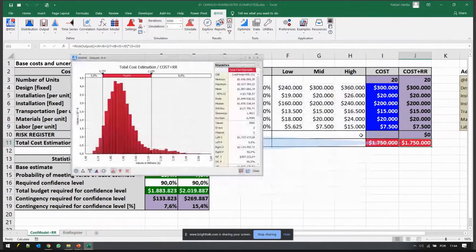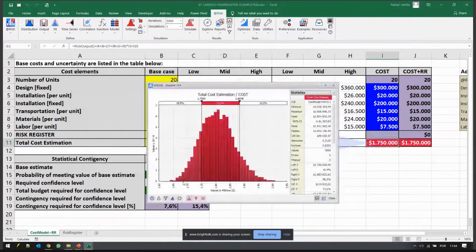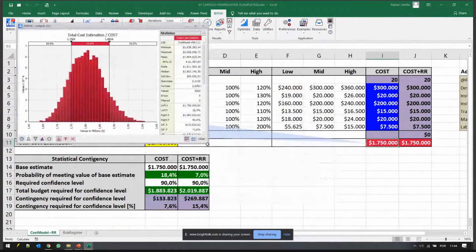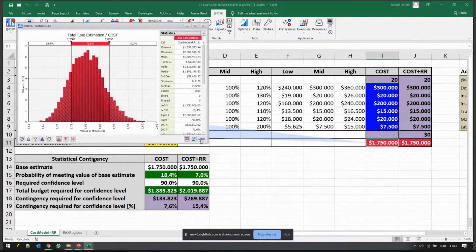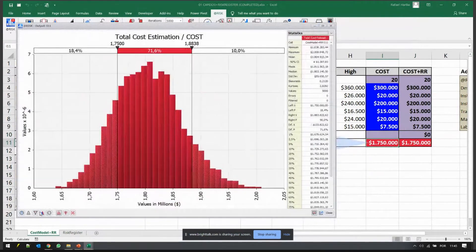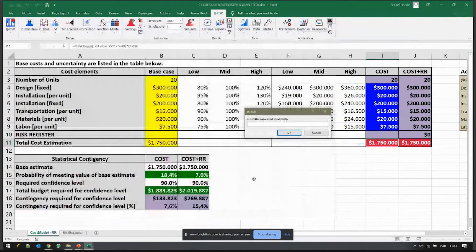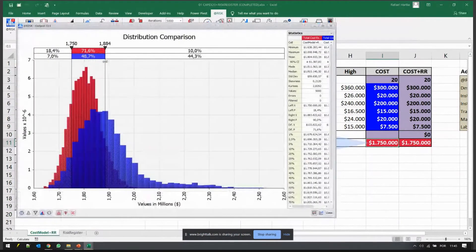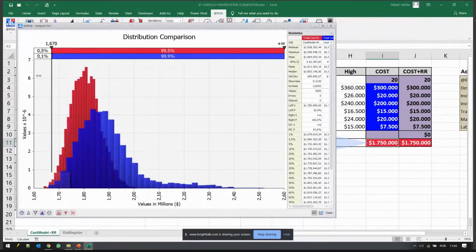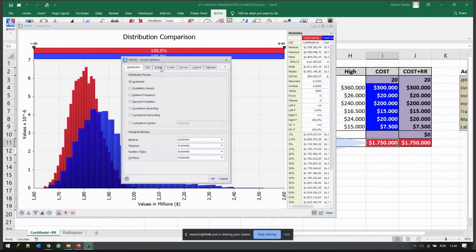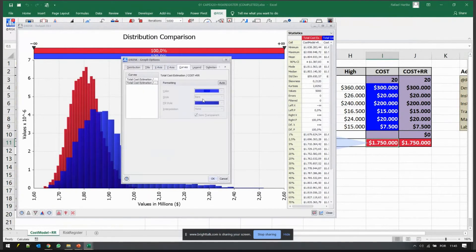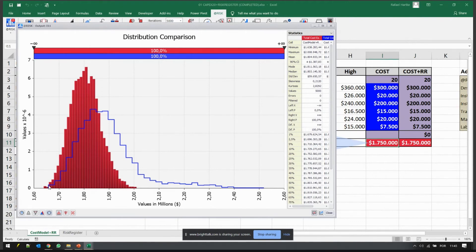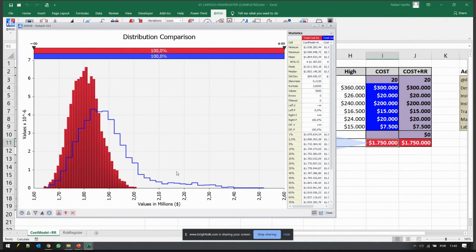Now we can map how these two distributions behave. I have in one cell the distribution for the original project without the risk register, and on another cell I'm going to overlap them. I can overlap the cost with the risk register. The first distribution in red is the one without the external risk events, and now in blue I have a new distribution where the minimum is more or less the same, but the right tail is way further to the right. Those risk events might add extra cost - they are unlikely of course, but they might add a lot of extra cost to my project.